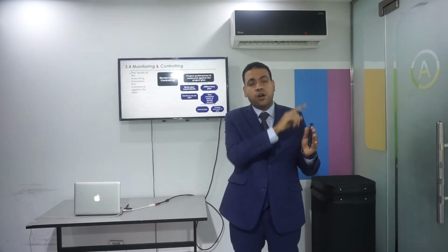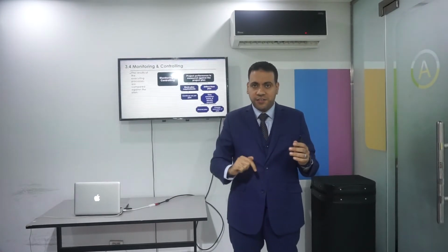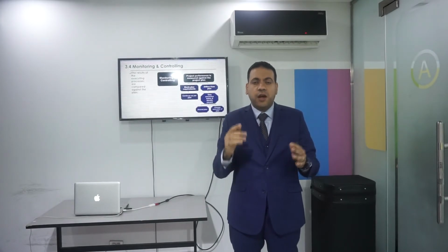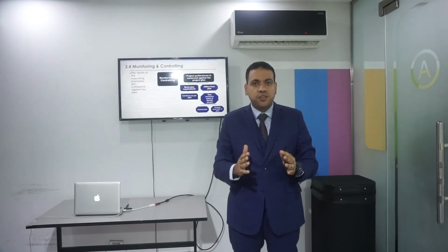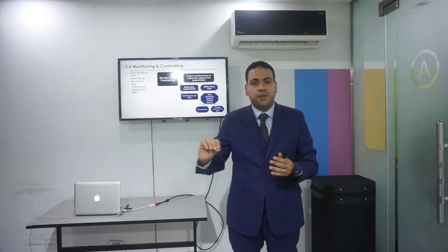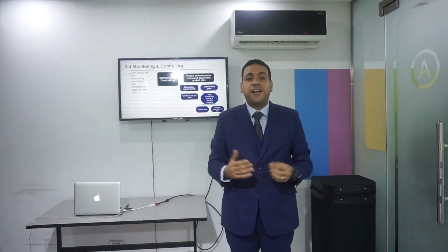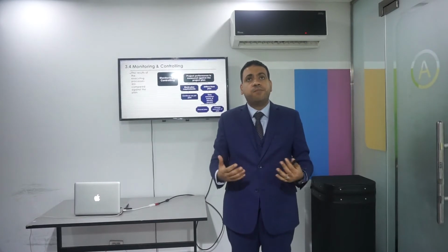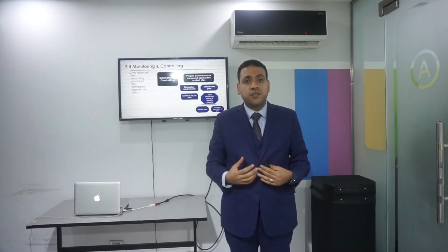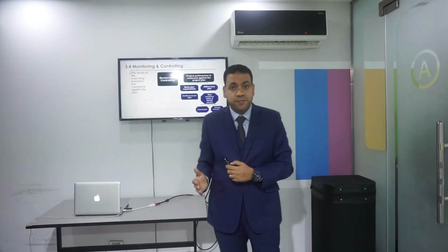When you change your plan, you are going to execute the work again. While you are executing the work, you are going to monitor and control it. If there is any change, you have to go back to the plan. If everything is fine, everything is correct in your project, you are going to continue per your plan. So for instance, you might find that you are behind schedule or you are late, so you can take corrective action, such as adding more resources to finish the project on time. Adding more resources means you can bring more machines, you can bring more workers in order to work in the project and deliver the service or product to the customer on time.